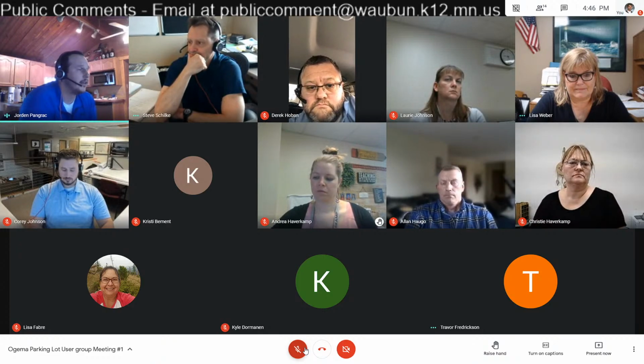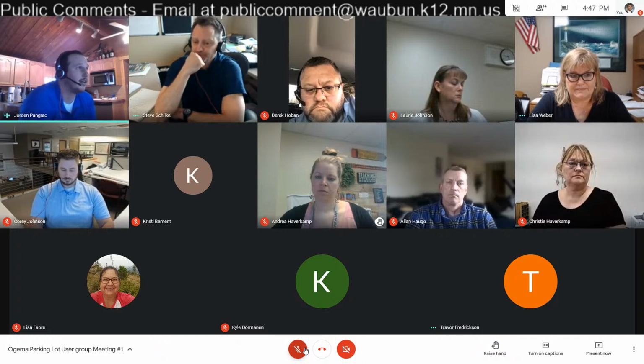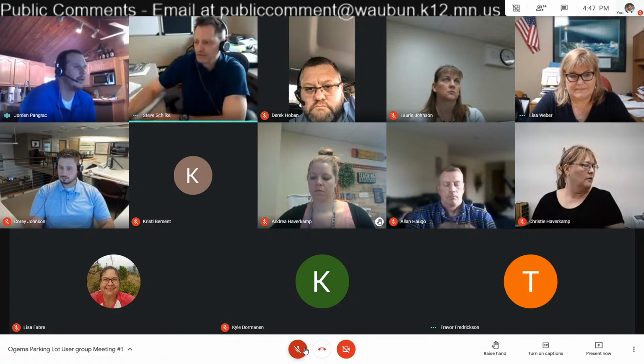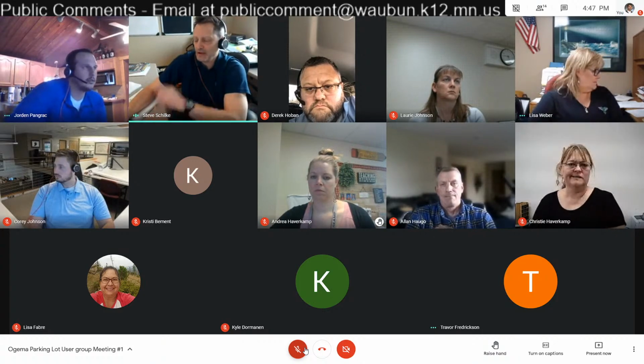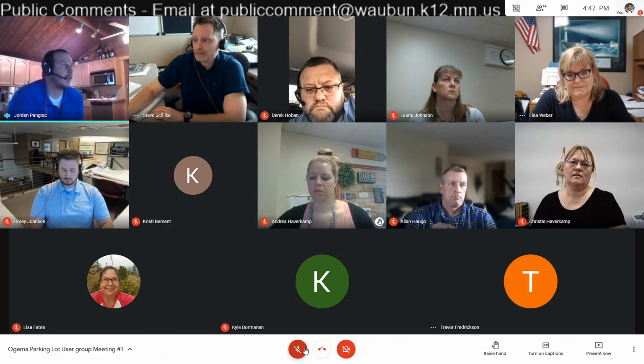Lisa and I will discuss if we want another user group meeting or not, but the next formal meeting will be the DD documents, which is design development. Steve, correct me if I'm wrong, but you'll have a good portion of grading figured out by then, or at least a preliminary grading layout. That would be the DD presentation. It will be a lot like this plan, with changes from what we talked about today, along with that grading.